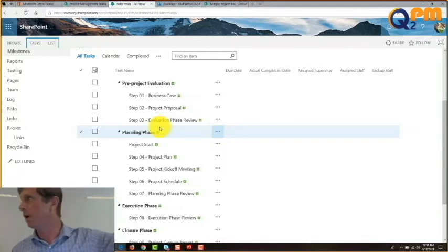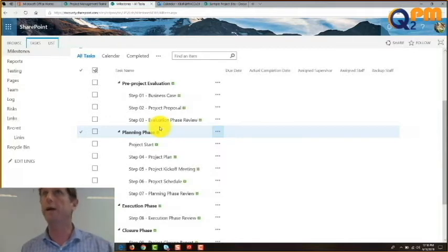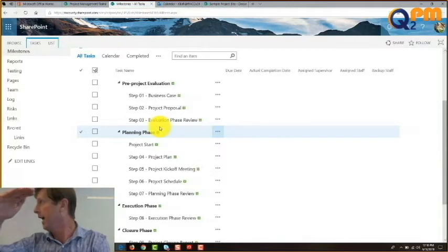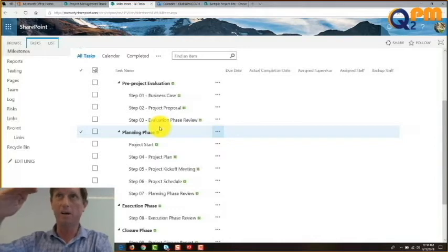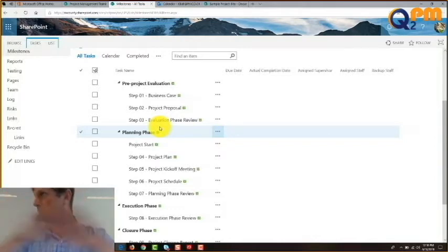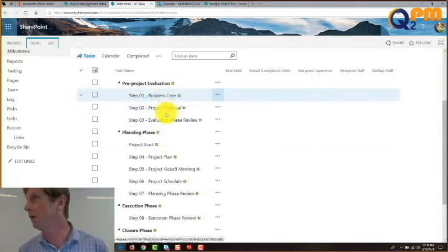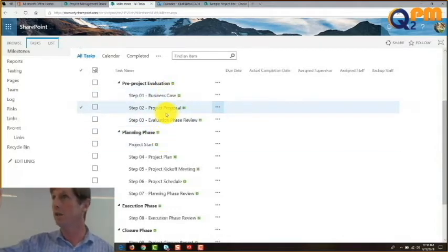And we do this pre-project evaluation bit, and we come back to them afterwards and say, this is a great idea. Here's what this animal looks like. And they're going, really? Oh, forget that. We don't want this to happen. And they cancel the whole idea. That's what happens in this pre-project evaluation stage. It actually becomes a project, or it gets filed in not going to do.